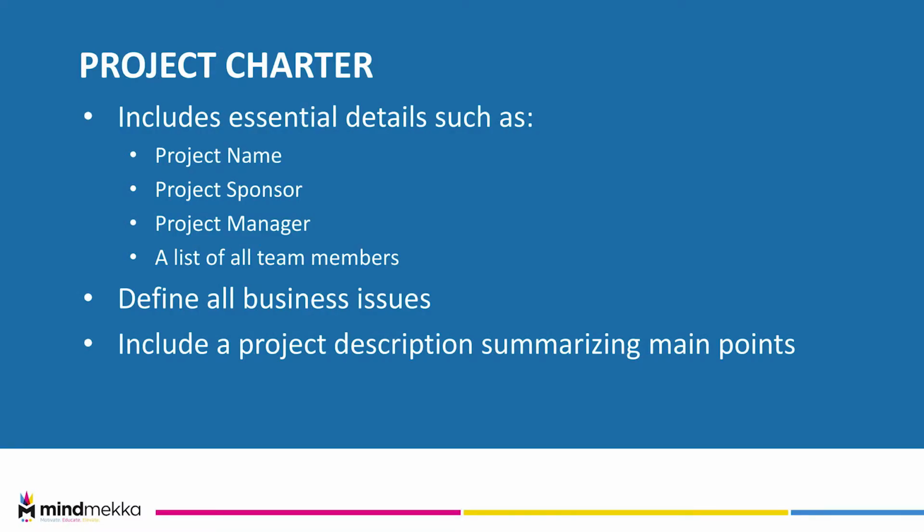At the top of your project charter, list the essential details of the project. These include project name, project sponsor, project manager, the person in charge of the project, and a list of all members of the project team. There should then be a project description, which summarizes the major points of the project, including its